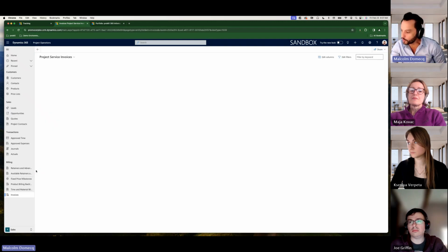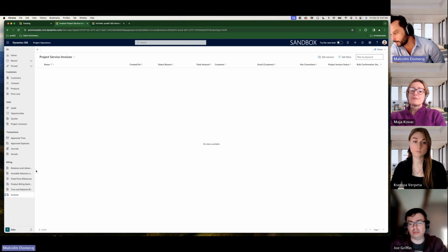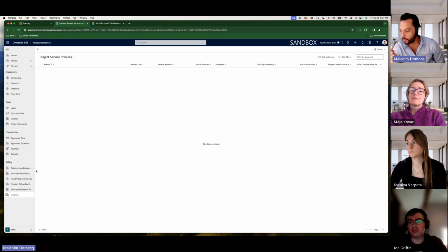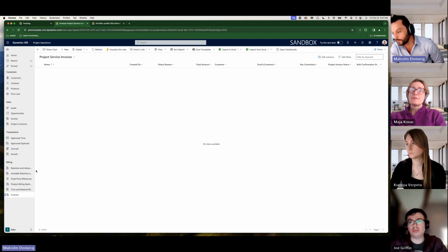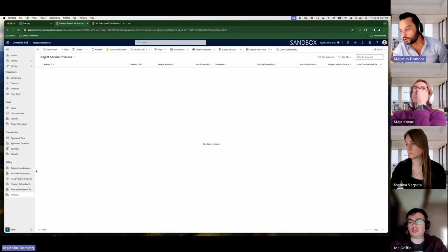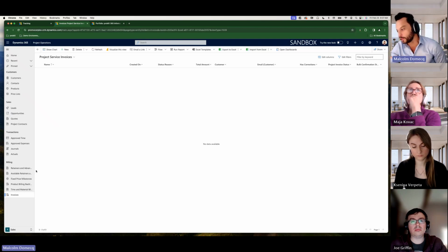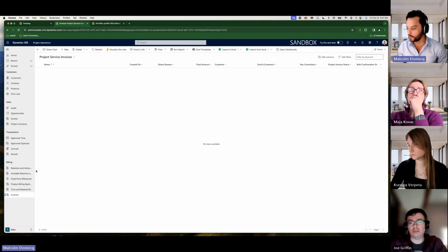You can accumulate it at the portfolio level. So you can define to start the batch invoicing process now with the portfolio. So I have all the projects associated to the portfolio. There will be some things that we'll need to work on if you associated projects that are of different customers. Do you want one invoice per customer? Because now it's not one invoice at the portfolio anymore. They cannot be aggregated across two different customers, right?